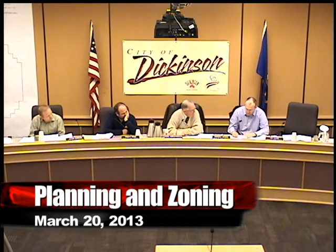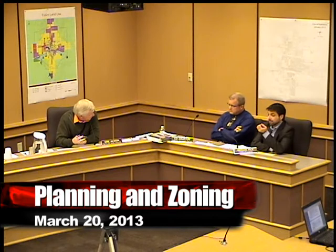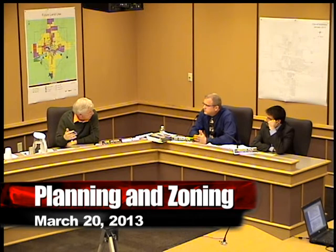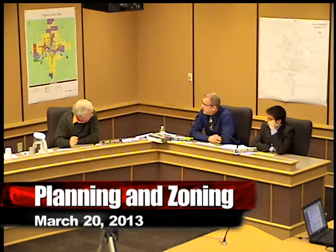Mr. Chairman, Mr. Jackson. I'd like to get Mr. Corton's take on the difference between continuing and approving and then taking care of these things. Commissioner Jackson, the difference between the continuance would be they have no entitlement. And as Mr. Nygaard has stated, he's not guaranteed, and it's up to him if he would decide to move forward with engineering. He has no entitlement. It'd be the same as he is today. It would give staff an additional 30 days to work with our consultants and a revised staff report, to give you more detail that we have not been able to provide at this point.